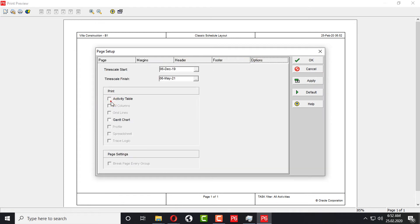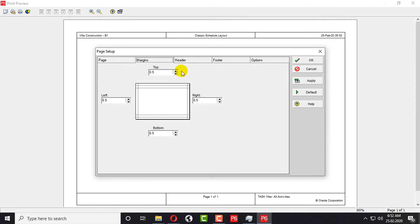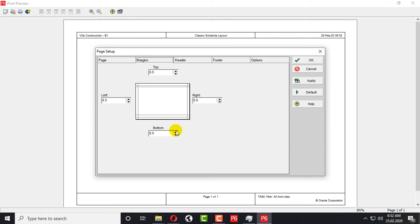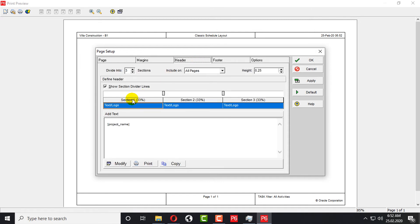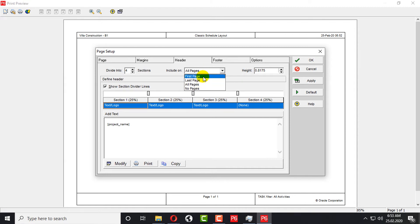Going back to Page Setup with Activity Tables, grid lines, and Gantt chart, the next step is the Margins tab. You can set your margins here — it's 0.5 by default. You can decrease or increase margins for top, left, right, and bottom. For the Header, you can add headers at the top. You can divide the header into three or four sections — for example 25/25/25/25. The height of the header is 0.25 and you can increase it to 0.75 or up to 0.8175. You can include the header on all pages or only the first or last page.